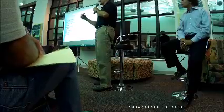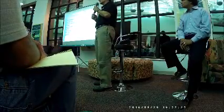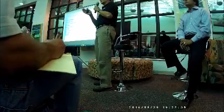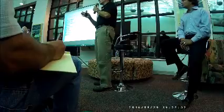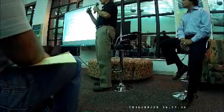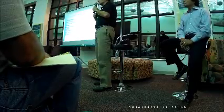So the idea is that they will use this data that's collected with FAA observers and sheets that are filled out and go back to the safety panel to evaluate: does this system have enough, are there any insurmountable challenges, safety risks going forward? If not, we're going to let you go to the next phase next year, where for 3 months we would be providing services from the RVA tower with the mobile towers as safety net.